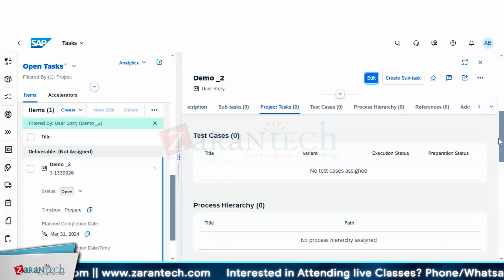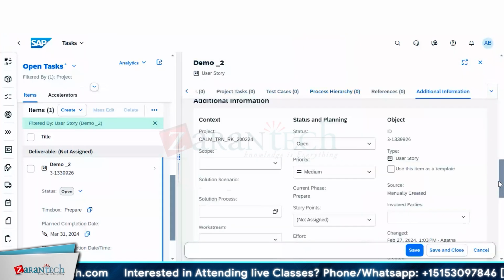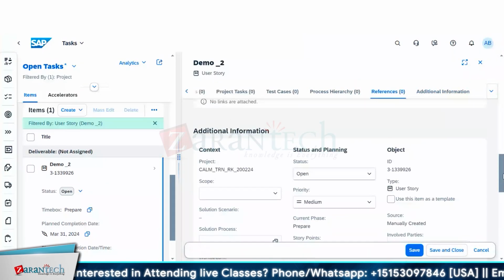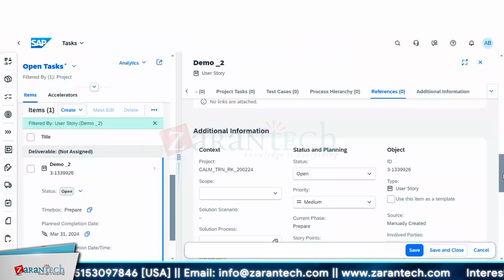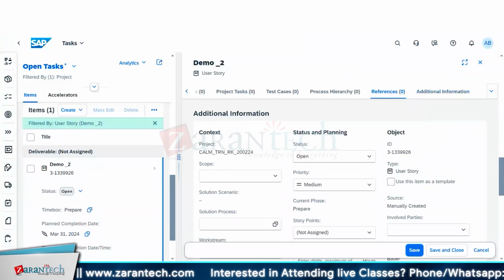But it is not mandatory to mention a user story for every task, right? No, actually, if we are following this, it's mandatory for each and every task. For each and every task, you will have an effort, say, 2 hours, 3 hours. If you do something like creation of the material group, you will have an FS, and an FDT you need to create. Yatish, for a standard config also, do we need to mention a user story? Yeah, of course. For a standard story, you are putting in your effort. Okay, got it.